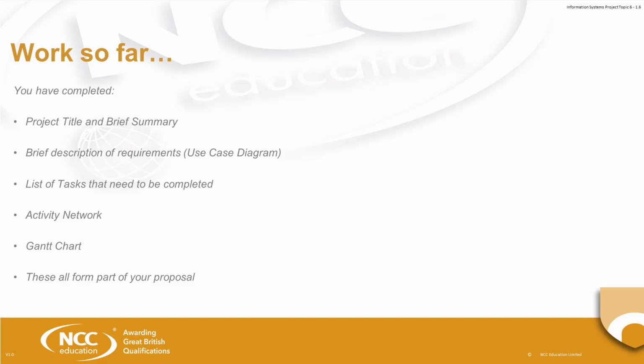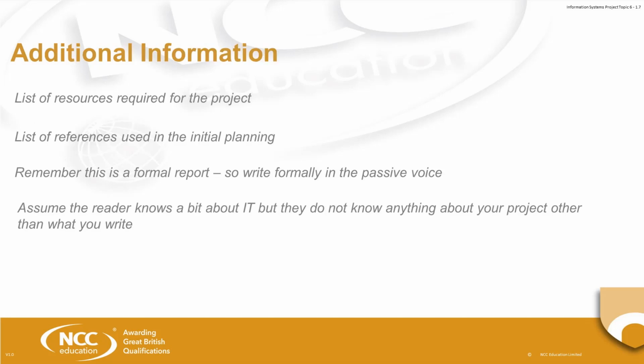However, the important document that you do have would be the Gantt chart, and that will need to be kept up to date throughout the project, reflecting the reality of what you're doing, what you said you're doing, and how well you're getting on with it. So all of those things that we've just talked about you've already done, and they all form part of your project proposal, so largely you've produced a rather large amount of work already that fits into that proposal.